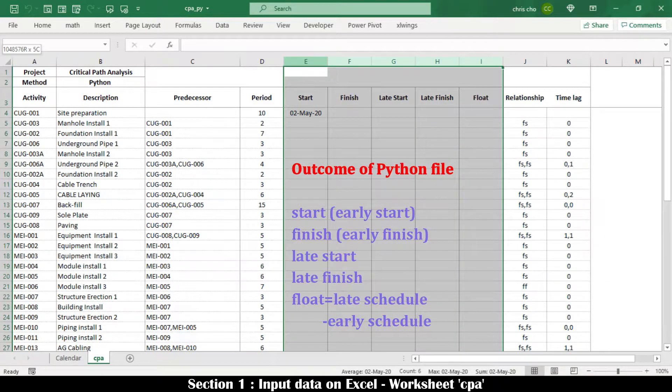The Python file is programmed to return for each activity: early start date, early finish date, late start date, late finish date, and float.